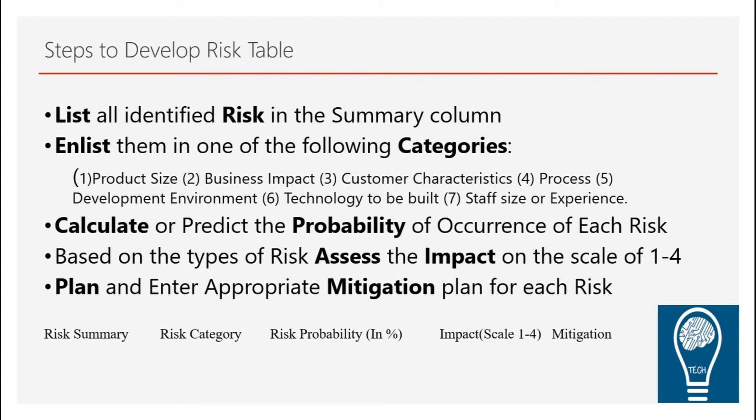As you can see in the table below, the columns include: risk summary, risk category, risk probability (expressed as a percentage), impact scale (rated 1 to 4), and the mitigation plan.